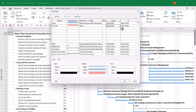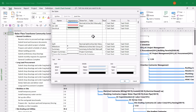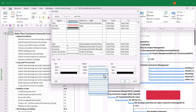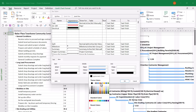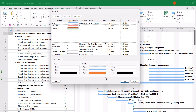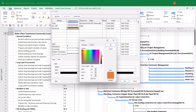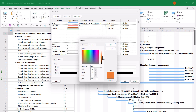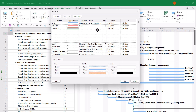Then I'll go to the Show For Tasks column, click the Pick List, and scroll down to Flag 1. I want this to run from the start of the task to the finish of the task. The next definition will be for Electrical. In the Appearance column again, I'll choose the solid pattern and select a shade of orange. I'll click the Pick List and go down to More Colors, using the slider control to give me a nice light shade of orange. When finished, click OK. Now I'll go to Show For Tasks and this time pick Flag 2, running from Task Start to Task Finish.